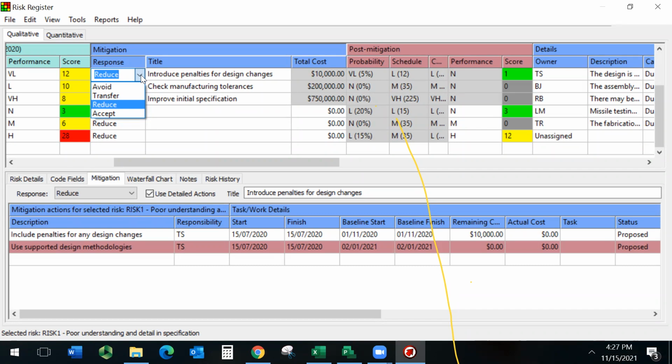You're going to send it to the portfolio manager or the PMO director so that they know about the risk and deal with it from their end instead of you dealing with it at the project level. So this is an uncertainty that matters to the project as a whole or to the organization, but doesn't matter much to the project manager. So instead of dealing with it, the project manager escalates it to someone else. Those are the strategies we call response, mitigation response.